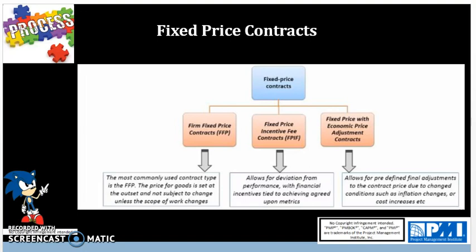performance. For example, in a fixed price award fee contract, the buyer might say there is a maximum of $50,000 award fee available. It will be apportioned or given out at the rate of $5,000 every month, meeting production expectations at a certain amount. This is a type of incentive contract. In many instances, the award paid is judged subjectively. Therefore, procedures must be in place in advance for giving out the award, and a board must be established to help make the decision fairly.